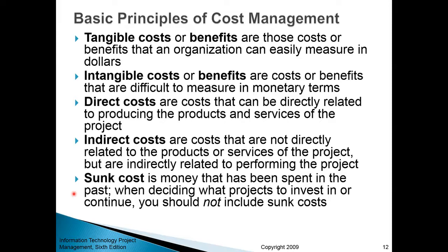An example of sunk costs in the field of project management would be something like this. You spend one year and let's say $1 million researching a particular technology that you were planning to implement in your organization. And after one year, it became clear that this technology is not mature enough. It cannot be used to achieve your goals, right? So that money that you spent on researching the technology is a sunk cost, meaning you spent it, it's gone, you cannot get it back. There's no way to get it back.